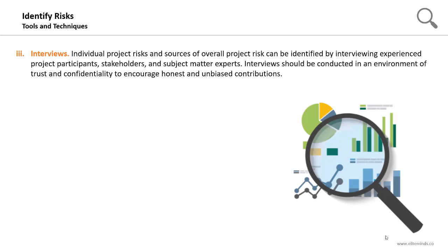Interviews is another data gathering technique. Individual project risks and sources of overall project risk can be identified by interviewing experienced project participants, stakeholders, and subject matter experts. Interviews should be conducted in an environment of trust and confidentiality in order to encourage honest and unbiased contributions.